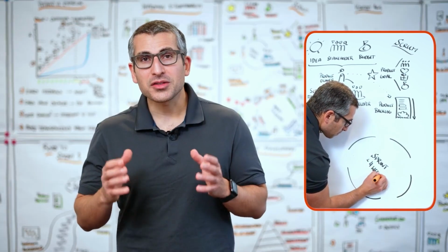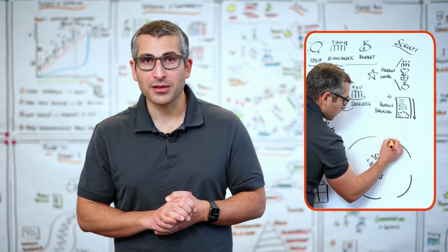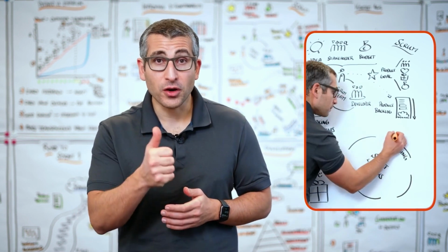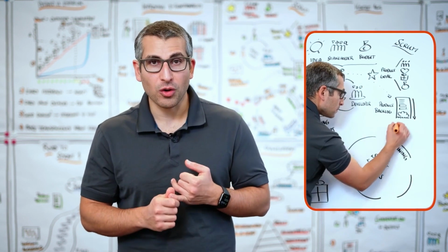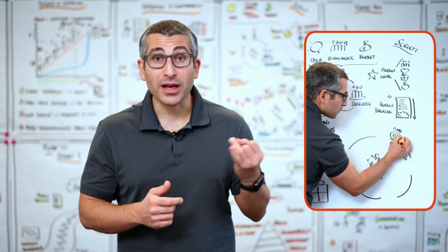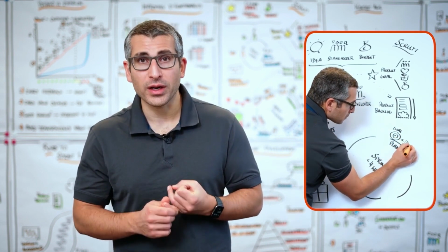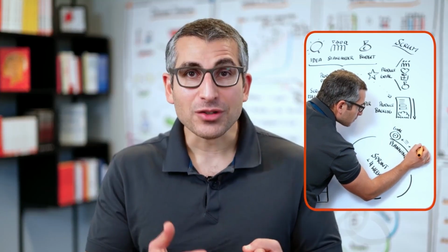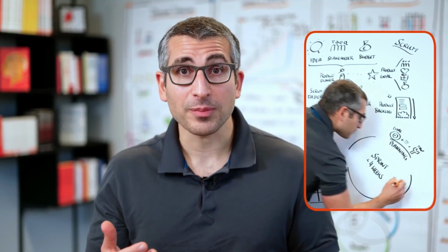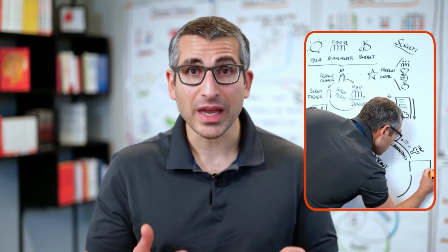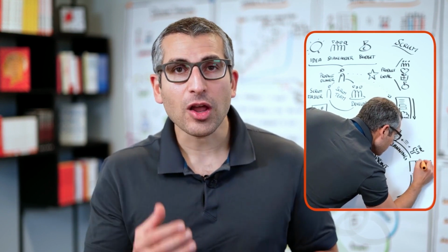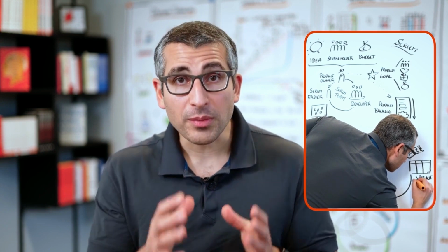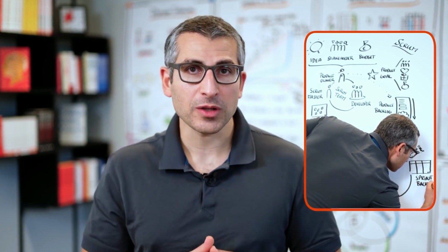Every sprint starts out with a sprint planning event. Sprint planning consists of 3 elements. First, what is our sprint goal? Ideally, the product backlog is prioritized accordingly. What kind of outcome do we want to achieve? Based on the priorities that we have in our product backlog and the capacity we have as developers, the developers select a certain amount of items and move them from the product backlog into the sprint backlog.